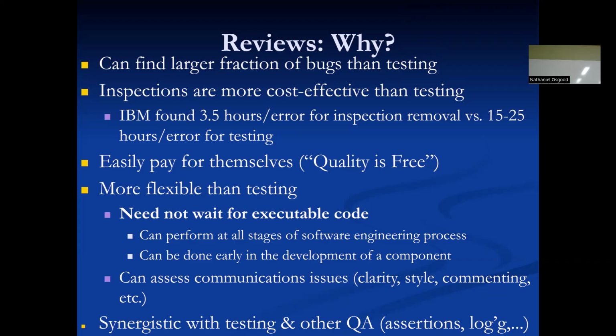I hope you are. Inspections can start soon on things like requirements, testing plans, first ideas in place for where the interfaces might be between different parts of the system, because those things can be done early. And such reviews often pay off for reasons that Jason articulated. The exponential curve, finding them early. If you find a requirement that is misunderstood, that can save you all sorts of rework, where you have to go back and do it, or different parts of the team still remember the old one and work at cross purposes.